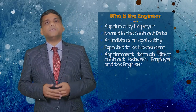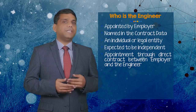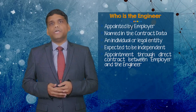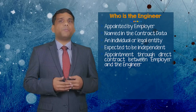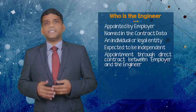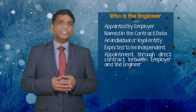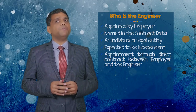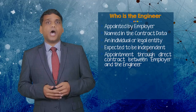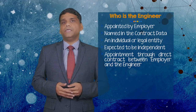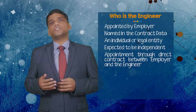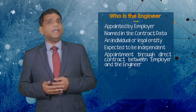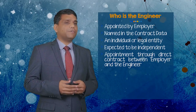This company names a person to act on its behalf as an engineer as per sub-clause 3.1. It is to be noted that FIDIC Yellow and Red Book does not prevent an employer from appointing a salaried employee as an engineer. Also, the engineer is included within the definition of employer's personnel in sub-clause 1.1.32 of FIDIC. However, appointment of an employer's employee as an engineer is likely to be a cause of distrust — whether an employee can act neutrally, fair-minded, and in an unbiased manner remains a subject of discussion.